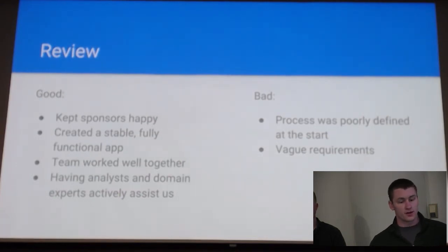Besides just collecting data, it wasn't really fleshed out how we were going to incentivize users to install the app. In the beginning of the project, we tried to build a full requirements doc anyway and elicit all the requirements needed, but that didn't really come together. As we delivered more functionality, the sponsor got a better idea of what he actually wanted and what could actually be done with the app. So things just sort of solidified as it continued.